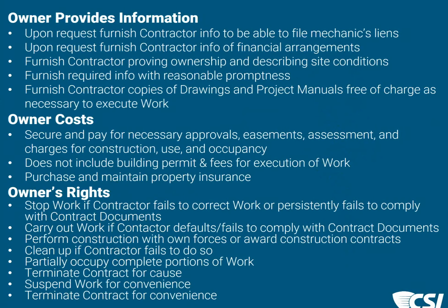They can also terminate the contract or suspend the work for cause or convenience should they find themselves in need to do so. And they can also terminate the contract for convenience, which is a right that they have. So those are a quick review of the owner's role in the construction phase. Matthew, are there any questions at this point before we move to the contractor?